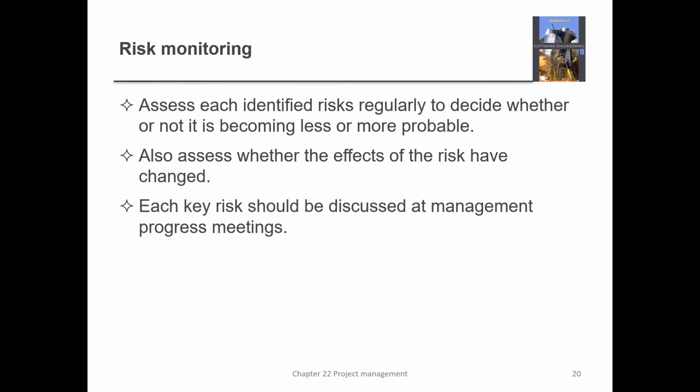This is a document that you have to keep updating. You determine the period at which you update your risks and the probability of the risk occurring, and you keep monitoring to see if these risks are still likely to occur, or what the probability is of them occurring.